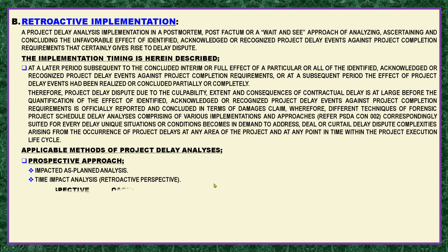Next, we have the retrospective approach. So we have two approaches here, the prospective and the retrospective approach. Under the retrospective approach, in a retroactive implementation, we can use the time slice window analysis. Secondly, we have the collapsed as-built analysis.